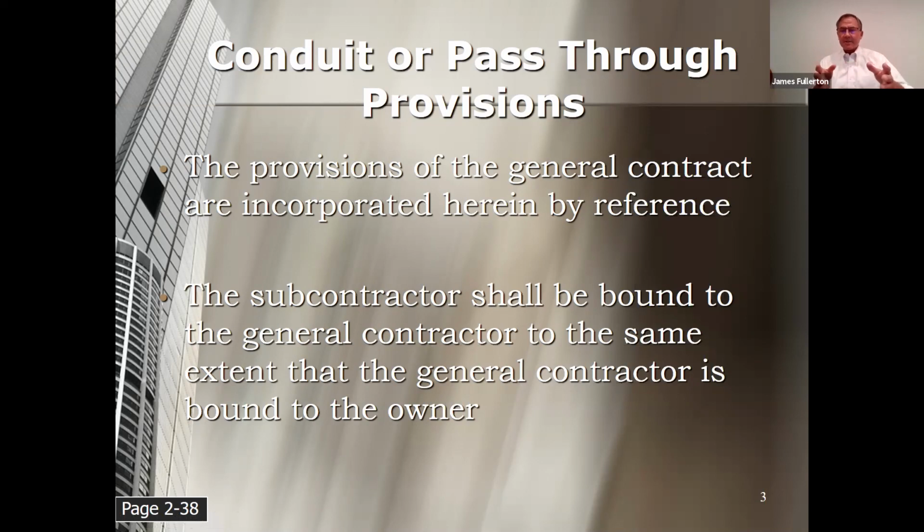It's just like a similar concept I've told you guys, I think in the contracts lecture we did a few weeks ago, that when you send a proposal or a quote or a bid, you want to make sure you include at least one page of legal terms with that. You're going to do that, one, because the owner or the GC might just sign your proposal. That might end up being the contract. And if you have an opportunity to control the contract documents, you want to make use of that opportunity. Sometimes owners or GCs will just tell you to start.